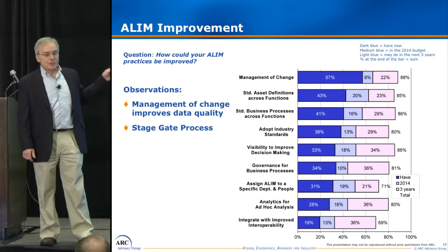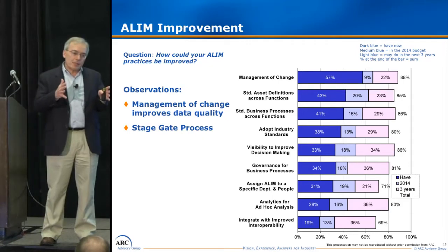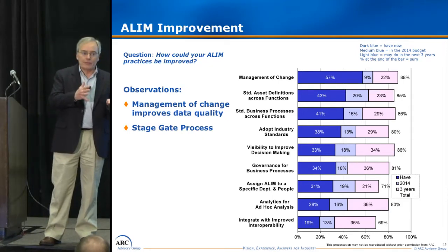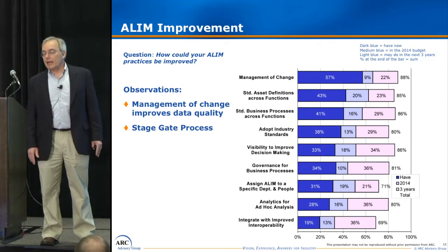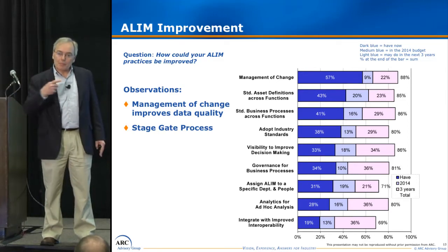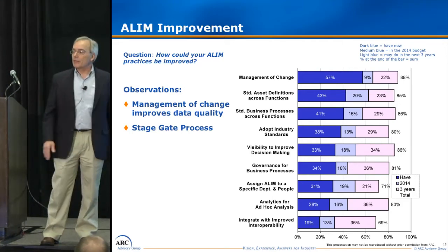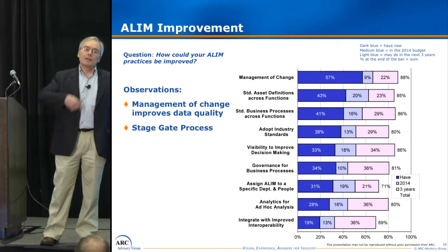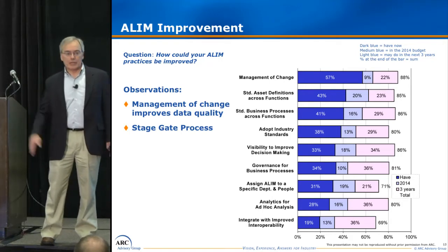And our recommendation is to use a stage gate process, meaning that as there is a major increase in either work effort or resources needed during the design and build of a plant or a project, you bring in the operate and maintain people so they're involved in the approval of that stage of the process. And they become aware of the information that's available, and they pull the information more gradually as the project is completed, rather than waiting for the end and having a massive transfer.